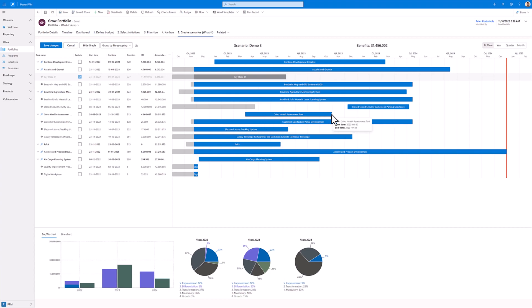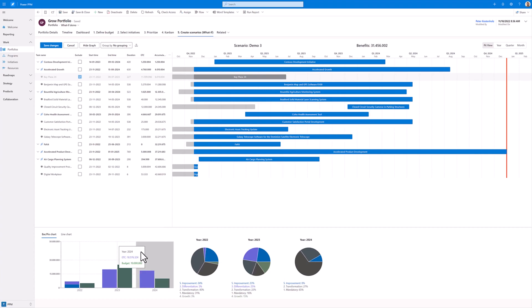Now if I expect a project to be delayed, I can also extend the project timeframe for that project. This means that we will also affect the projected cost for this project.